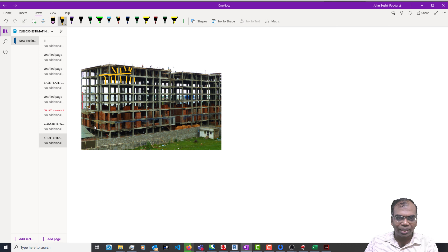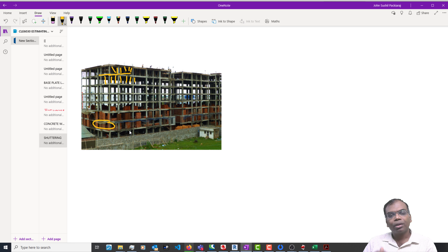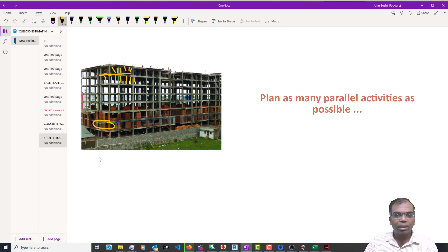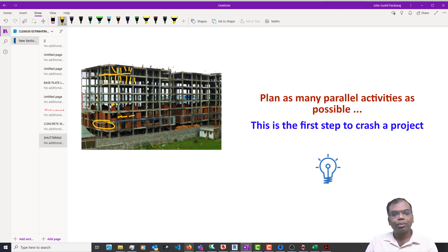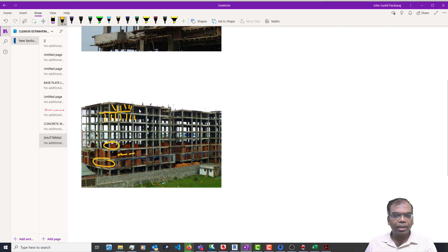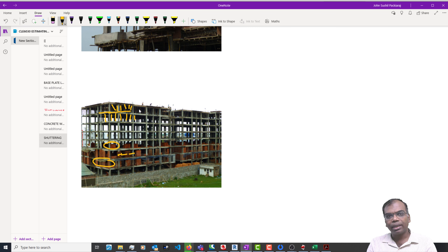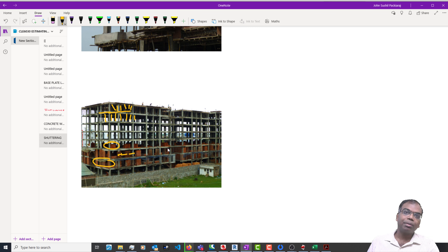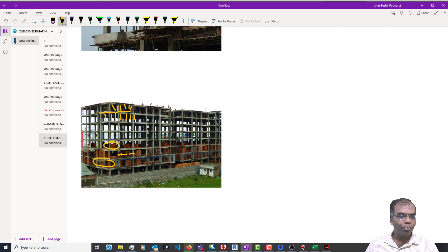Another very important thing to point out: in this structure, you can see that on the first floor, they started to do the work on the walls. Maybe the first floor has been fully completed, the second floor is work in progress, and the third floor - they started to bring up the blocks and keep it ready for work to start. These are aspects of the sequence of work, how much material is required. If you can do more than one work in parallel, that is a very important concept in project management - this is what you do when crashing projects.